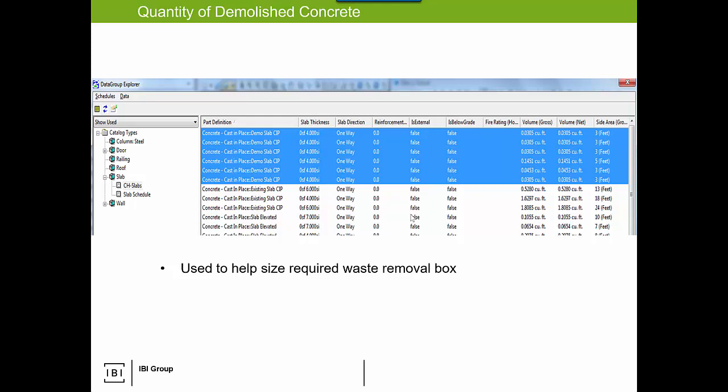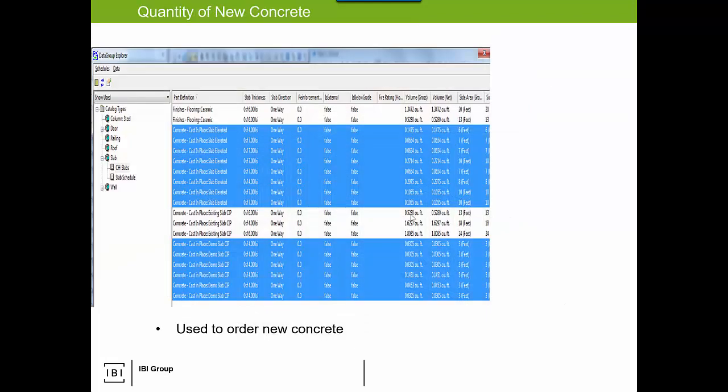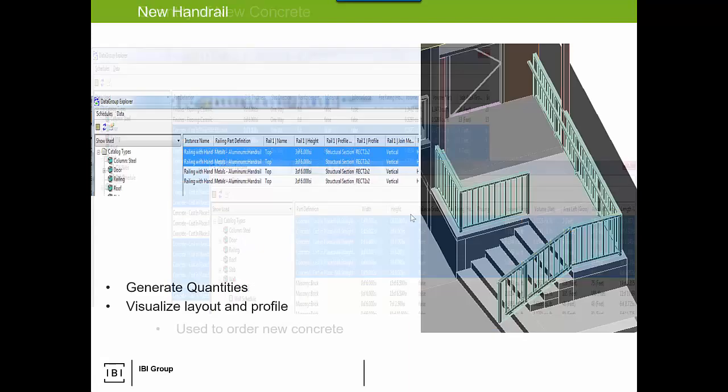We then modeled the new porch reno, and I was able to very quickly quantify volume of concrete, linear of handrail. The simplest thing, how many bags of concrete does the homeowner have to procure? How many components of the handrail? Simple BIM, monitor the construction, and see the output, right? This is BIM to its most finite element, if you will. Valid project, small scale, able to be done.